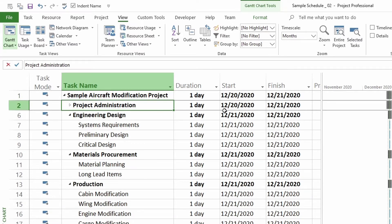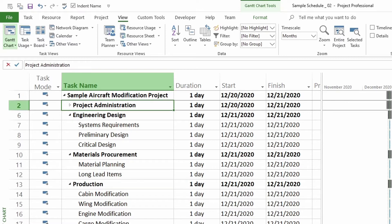All the dates have rolled up underneath that. The other way to roll up each section is to select any task including the summary task and then go to the task tab and open the drop-down menu for outline.